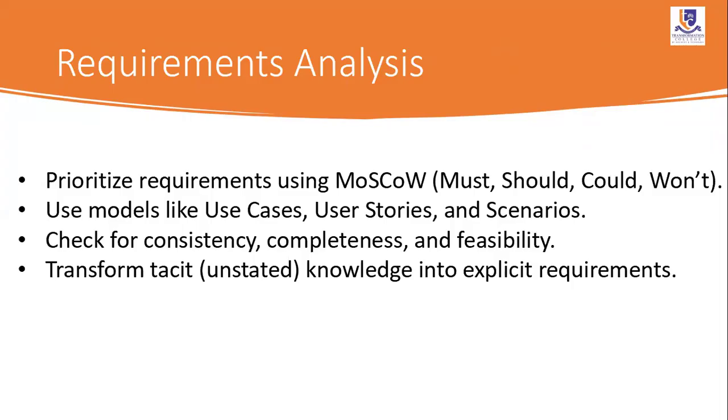There's also the requirement analysis that we BAs need to understand how to prioritize, how to do a priority. Prioritization, I think, is also among the 50 techniques in BABOK to deliver business analysis. You need to know how to do your prioritization. You prioritize your requirements using the must have, the should have, the could have, and the won't have.